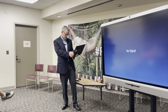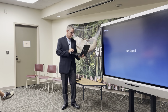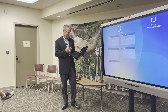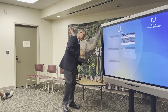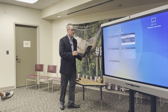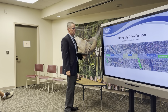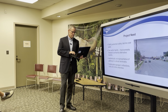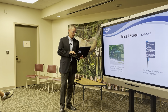What is the update on 7th Street? Construction is to be substantially completed by November 4th. They're working on the median between Norwood and University, just the last little block. What's left from there is finishing the landscape on the median, irrigation, and then mill and overlay and striping. Would the landscaping be in? Yeah, everything should be in by November 4th.